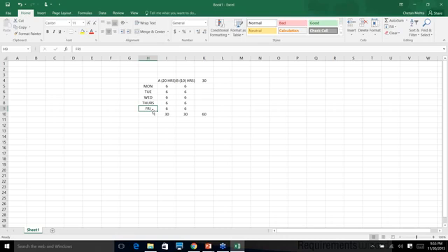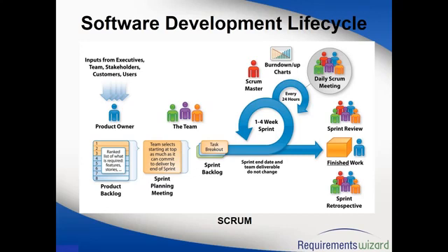So if you pick 2 stories, by Friday evening the system should support those 2 stories. If you show the system to your product owner, they should be able to see those 2 stories supported by the system. So let's suppose the top 2 stories were, the first one was create an account and log in. So by Friday evening, your product owner should be able to go and create an account, and they should be able to log in. Of course, they cannot do anything beyond that, but at least these 2 stories are complete and the system is supporting them. Right? Are you guys clear? Yeah, Chetan. Yes. Okay.